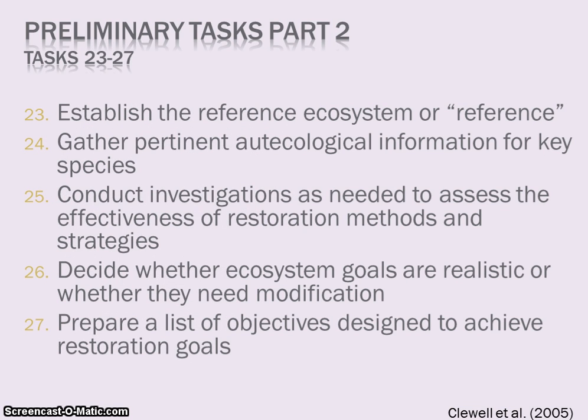Under Step 2, preliminary tasks, tasks 23 through 27 focus on the reference model, that is, determining the reference condition for this project. This is a critical part in the restoration planning process and should not be overlooked or minimized. Realistic, project-specific knowledge and objectives must be developed to facilitate project success.